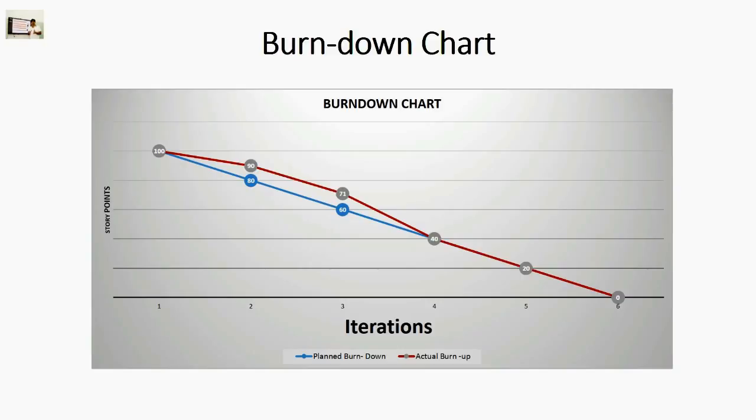Now let's have a quick look at the actual burn down. The actual burn down is represented by line red in color. You might have noticed that during the first two iterations, the actual burn down was less as compared to the planned burn down, which indicates that we were lagging behind the plan during the first two iterations.